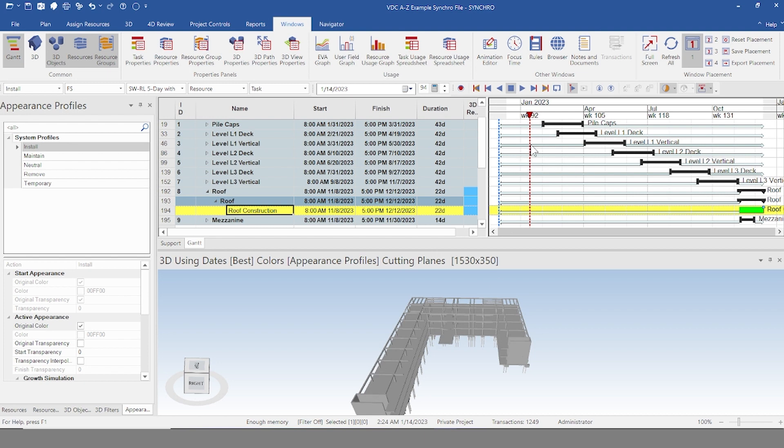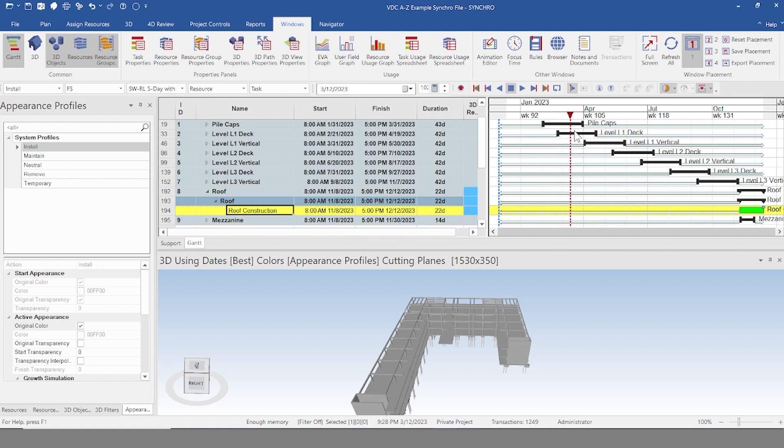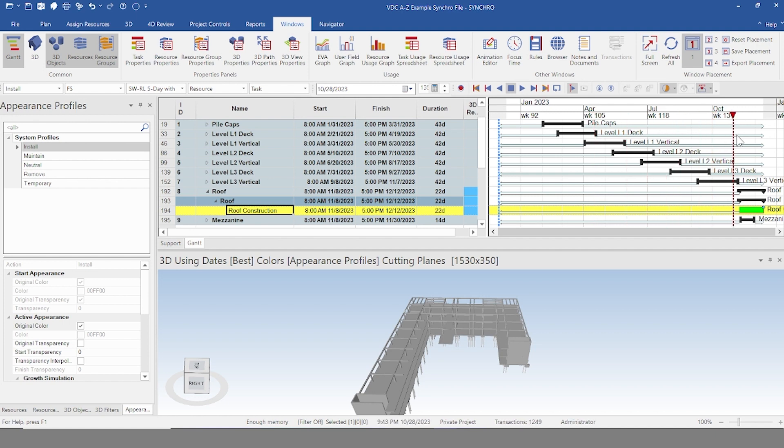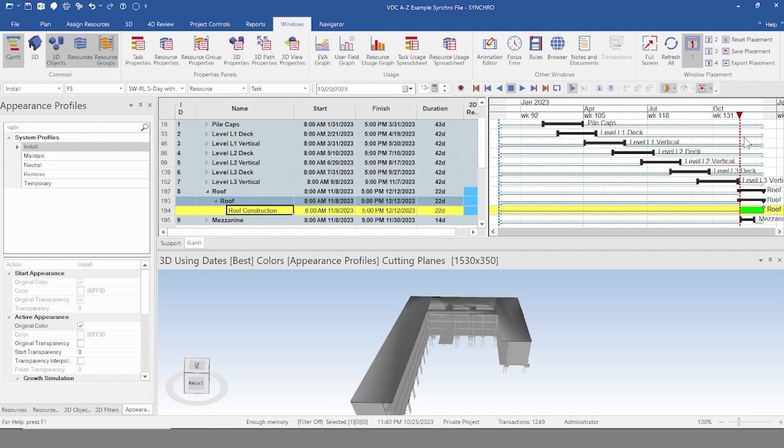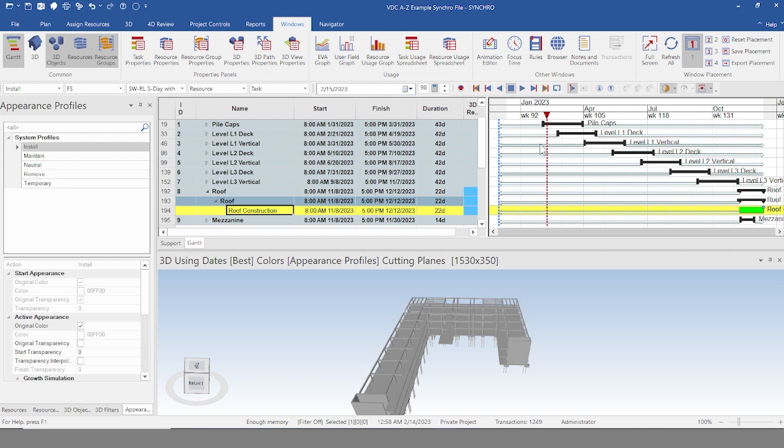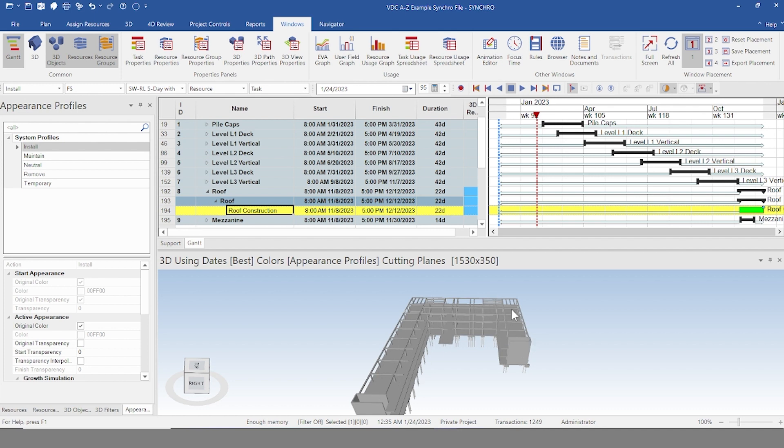And the reason for that is because this red line, this is where we're at in our schedule. This is going to show the condition of the model at this point in the schedule, at least the elements that you've tagged. And this roof over here doesn't happen until we get all the way over here. See, so it hasn't been installed yet. Now it's been installed. Now it hasn't been installed yet. So if you keep your timeline earlier in your project, you can work your way down from the top. And as you assign objects, they'll disappear. That's usually a good way to go about it.